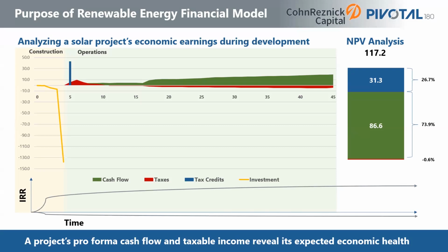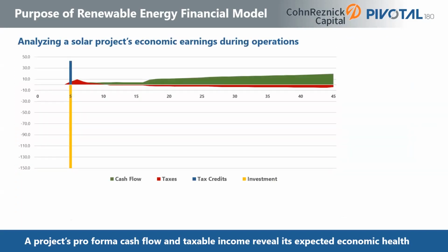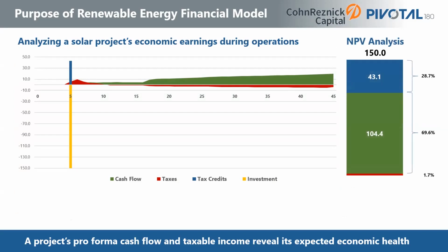It's important to note that the spectrum of expected returns can be quite broad at the early stages of project development. Many potential projects will never reach the phases of construction and operations. The money spent on those projects will be sunk costs. Once a project reaches operations, a great deal of uncertainty has been removed. The net present value of the project is significantly higher than it was at the start of development.